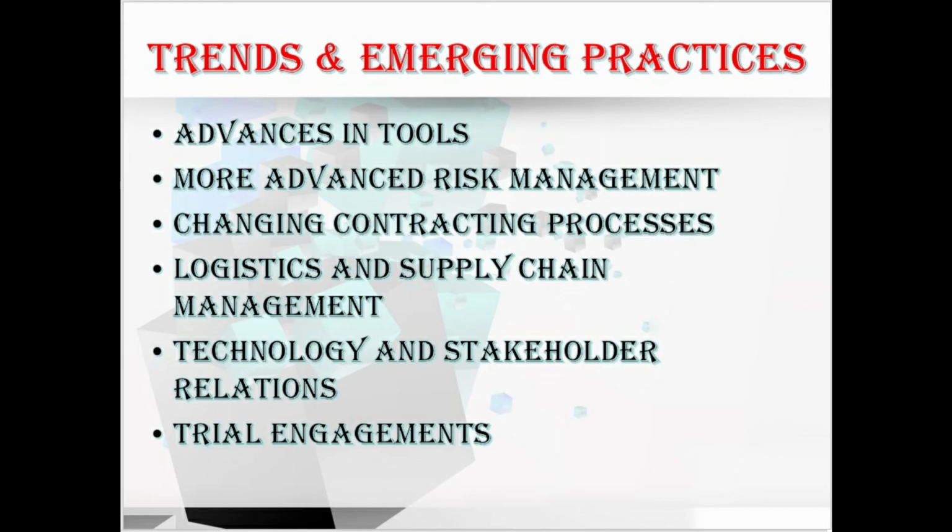Not every seller is well suited for an organization environment. Therefore, some projects will engage several candidate sellers for initial deliverables and work products on a paid basis before making the full commitment to a large portion of the project scope. Hope you understood this point, the trial engagements.